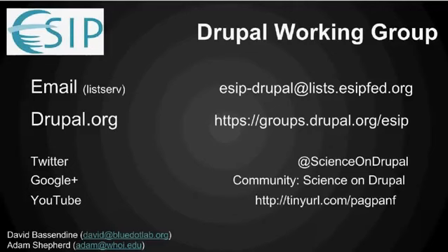We do our sprint planning also on Google Hangout, although sometimes we do the upfront part of the sprint planning, identifying a bunch of questions that need to be answered before we can complete it. Then people go away and do their research and answer their questions, and we reconvene to commit together to the sprint.